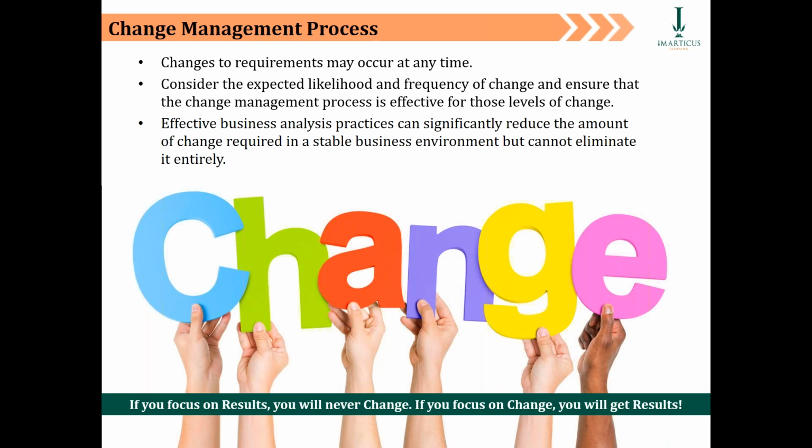Now you might like to be careful, but the fact is, what is your ultimate weapon to counter scope creep? Obviously, guys, it's the change management process. And change management means I have a certain fixed scope. If the work goes beyond that scope, because you are giving me additional requirements, it will trigger a change process.